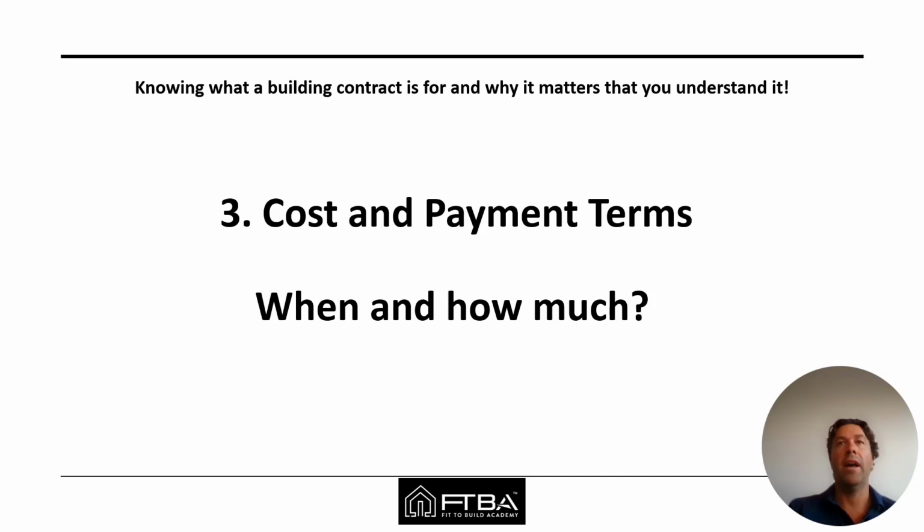These ones require expertise by the architect, or in some circumstances a quantity surveyor is involved, and they come and assess the percentage complete of the works under the contract on a monthly basis. Then a report is issued to the builder. They will agree on a figure, and then the builder will submit their claim on that basis. In that circumstance, the client is giving permission to the architect and the superintendent or the quantity surveyor to make the decision on percentage complete. And typically, you will need to stand by that as a client if the experts are saying that X percentage is complete.